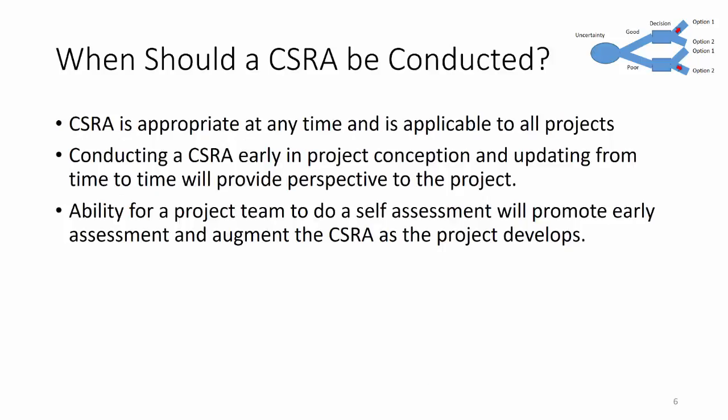Once we agree that CSRA is important, it's really appropriate at any time and is applicable to all projects. It could be early on when you're just conceiving of it and it would be a simple CSRA, or it could be much later when you're getting ready for final investment decision. Conducting the CSRA early in the project and updating it from time to time provides perspective so we don't get locked into some overly optimistic schedule or cost estimate. It gives the project team a chance to do a self-assessment and augment the CSRA as the project develops.